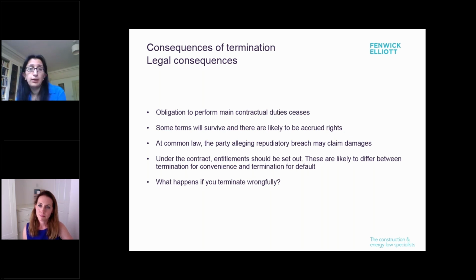You retain that right following the termination. I'm looking at the clock, so I'm going to go very quickly. But one case that is very much being discussed at the moment is Triple Point against PTT, where liquidated damages have generally been considered to be an accrued right, but the Court of Appeal has recently said that following termination, liquidated damages in that case were not the accrued right. Instead, the right was general damages for delay. That case is going to the Supreme Court, and it'll be interesting to see what happens.